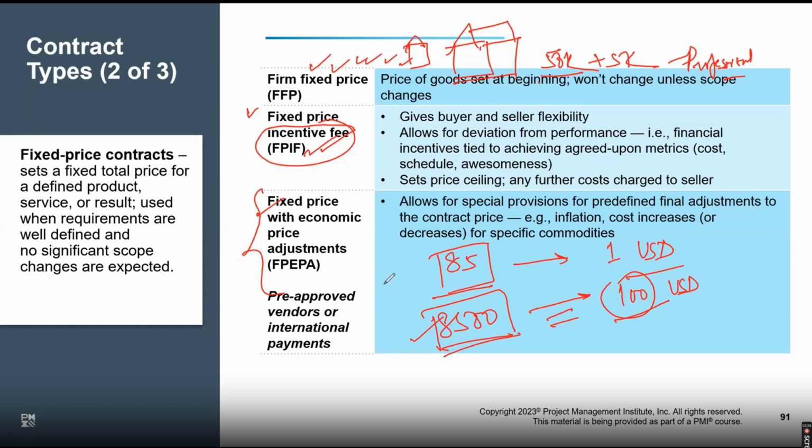Like Mr. Hassan mentioned, it's all about nature. So it's up to the legal contract team to look into whether it falls into force majeure or not. Bottom line, it is only going to be involved if foreign payments are involved. If I'm in UAE and my payments are also happening in UAE, the vendor is in UAE, this clause will not apply. But if I'm in UAE and my client is in the US, I will definitely have this clause incorporated, so nobody gets impacted here.